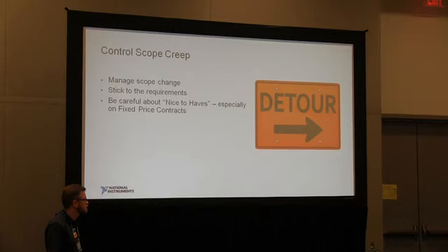The other thing to consider is that sometimes those scope change items delay the project completion date. Maybe you can work things in parallel, but if not, that needs to be negotiated as part of the change to the contract, extending the delivery date for these extra items that you've requested and are willing to pay for.